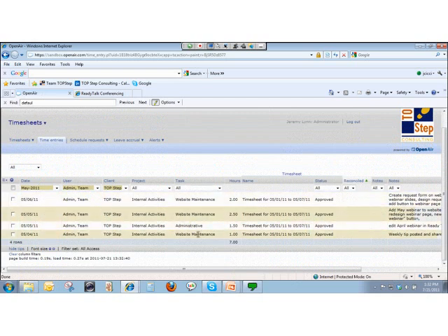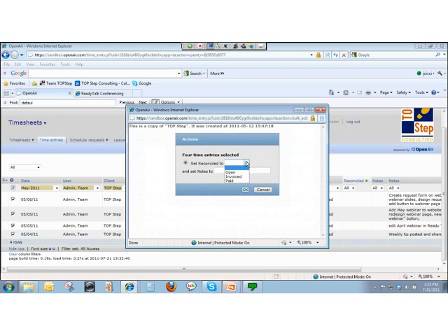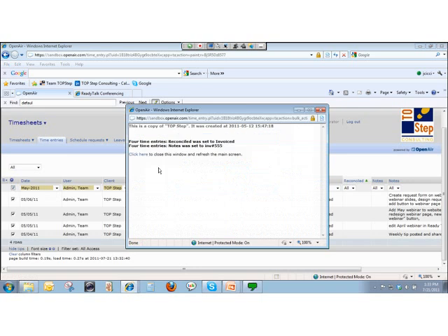So I'm going to say, you know what, I haven't reconciled that, which means to me I have not received an invoice. So I'm expecting to pay this person for the work that's been performed in the month of May. When I do receive the invoice, I turn around and say, oh, yep, the 7 hours match. So I'm going to go ahead and mark, I call mine reconciled versus status, but I can mark it as invoiced and say the invoice number is 555. Okay, great.